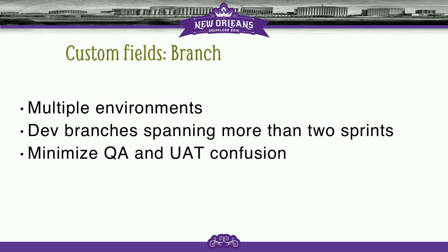Another one is if you're using multiple environments, set up a field for branch so that everybody else knows where that ticket is, because otherwise you'll have it buried in a comment. Yeah, this is going out on the Dev 3A environment. Make it a field, really easy. So then the QA and UAT people know where to look.